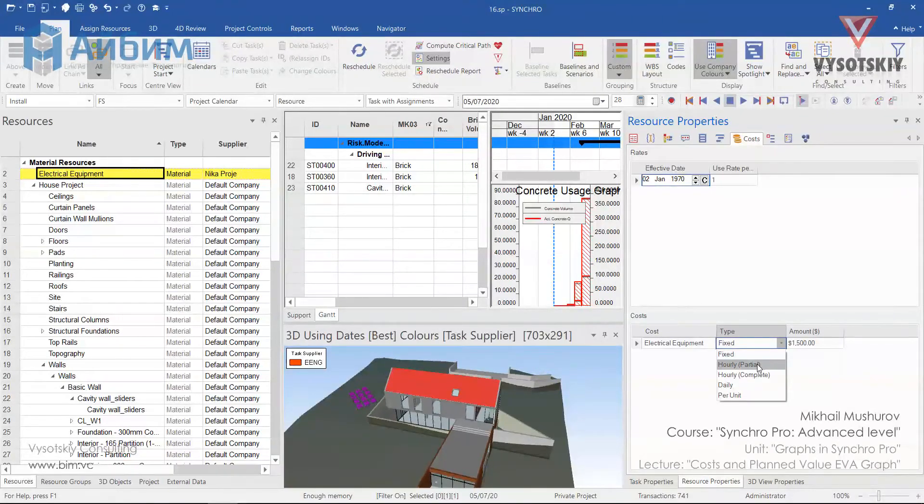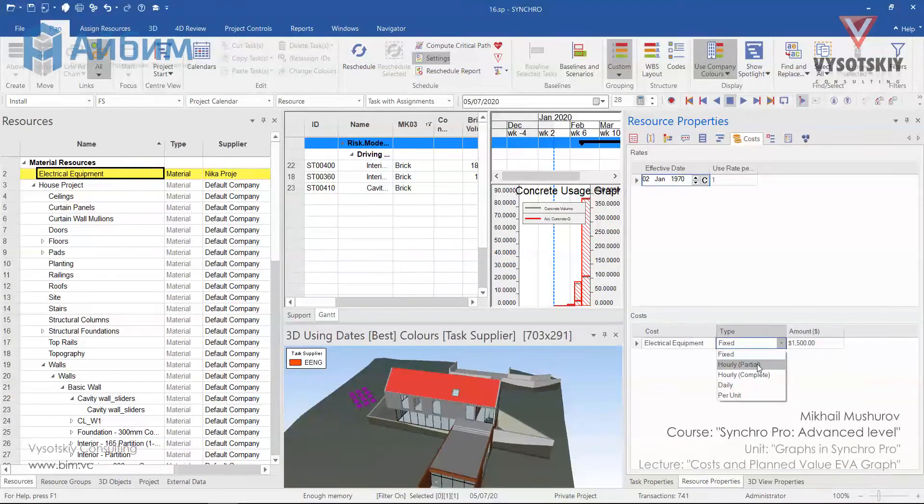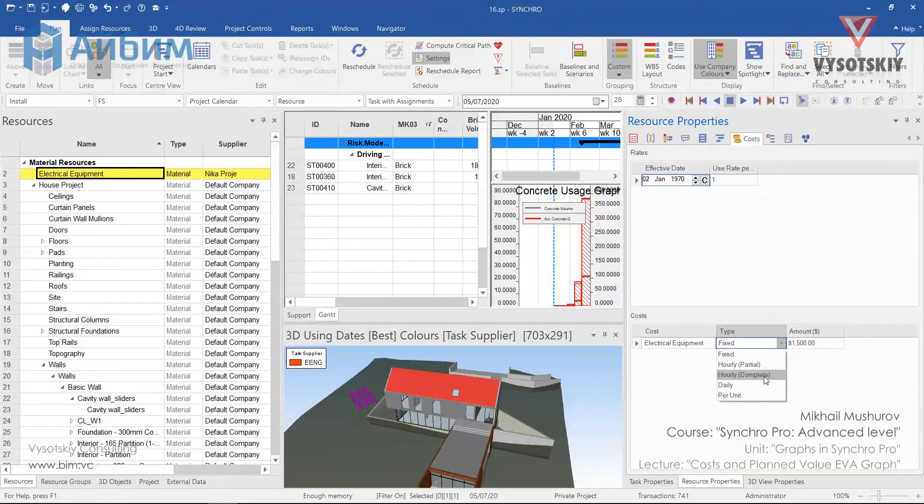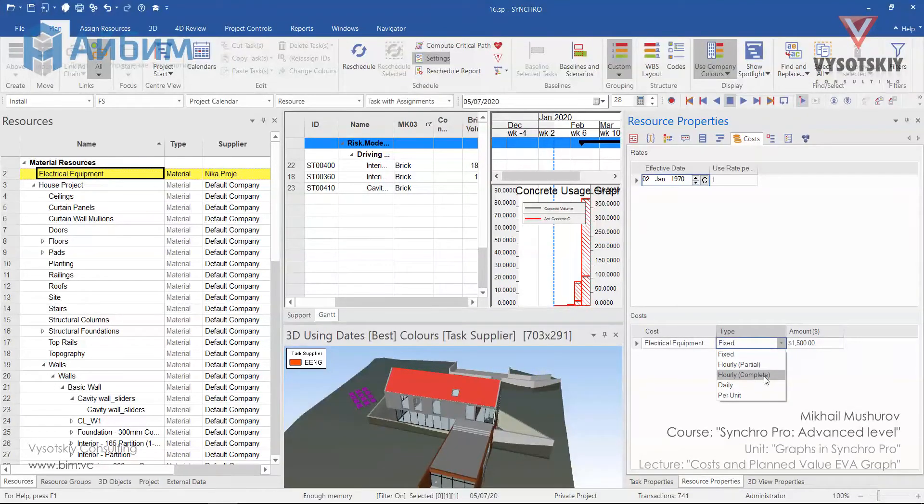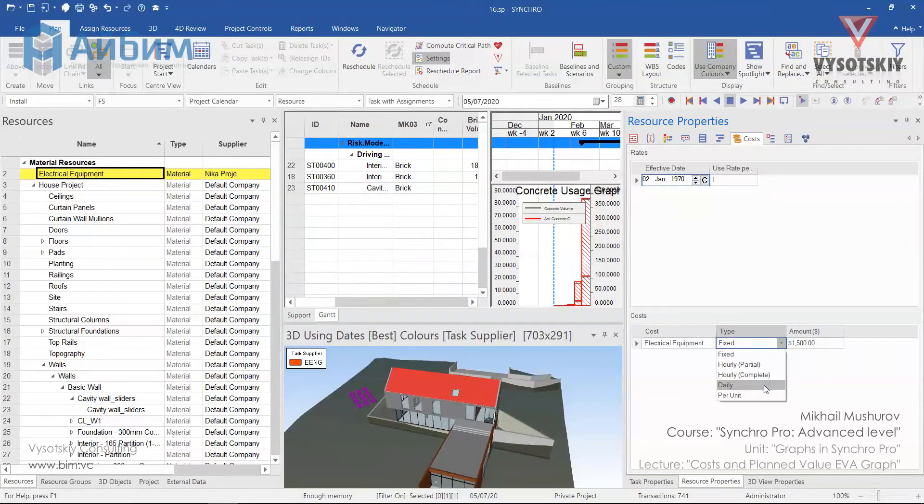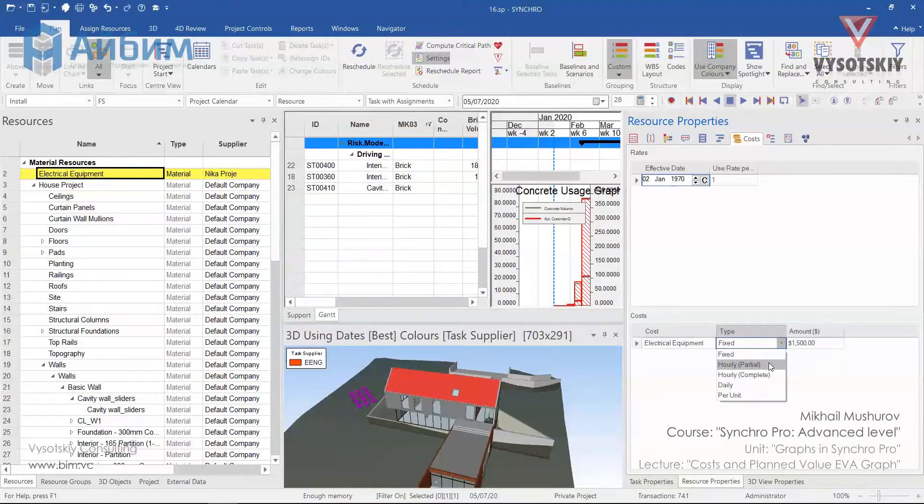For hourly complete, hours spent considered as completed to the next nearest hour. Also daily or per unit. We will select fixed.